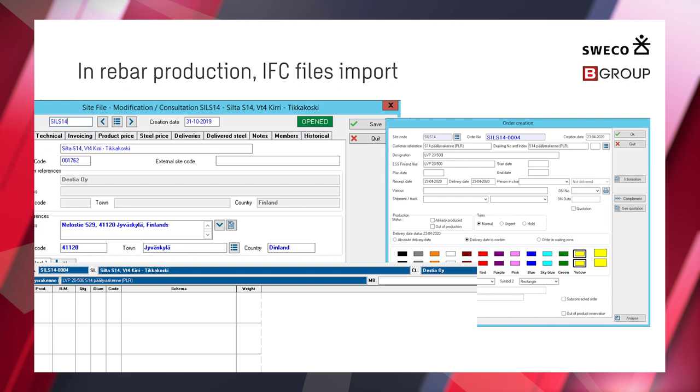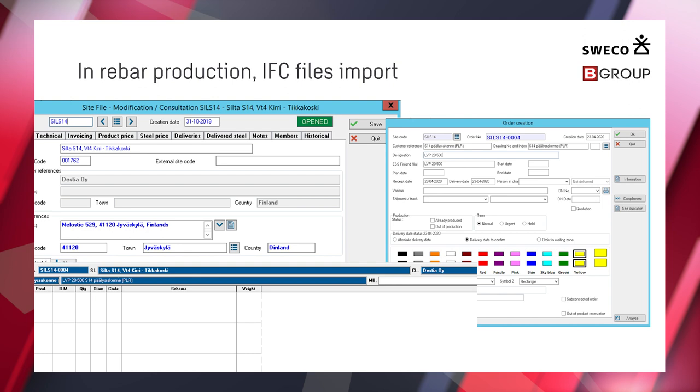I want to know if the rebar fabricator had previous experience working this way, and how challenging was using the IFC model directly in the bar bending machines and so on. Maybe Jaakko or Markku? Our supplier didn't have any experience beforehand, and actually it hasn't been challenging at all. They only had to make some modifications to their systems, but once those were done, everything has gone pretty smoothly, and there have been no mistakes in rebar shipments.